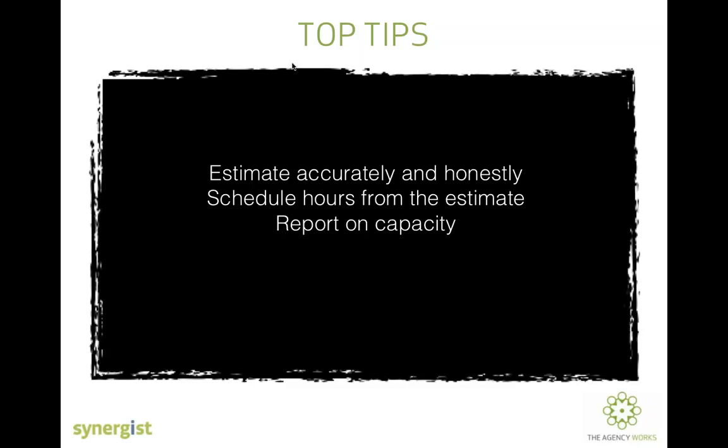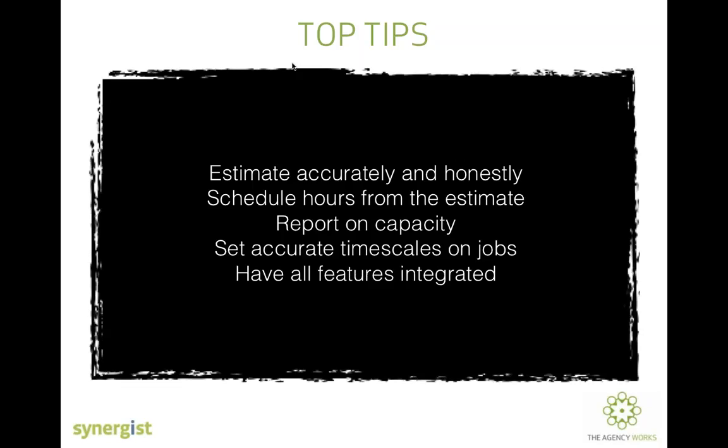All right. And the next thing is set accurate timescales on jobs. So going back to the Gantt chart, ensure that you don't just put an estimate together and give it to somebody, because that's not going to give you any capacity plans. You don't know when you need to do those hours. The studio team, you don't know if the studio team is going to be busy in a month, busy in 2 months. If you set timescales on jobs, you will know that, because that will fall through on your capacity plans.